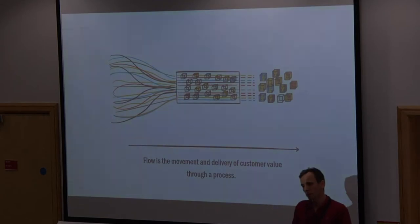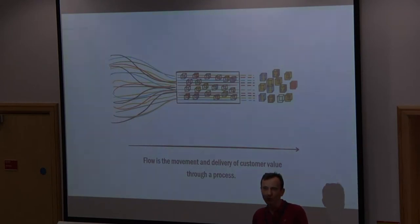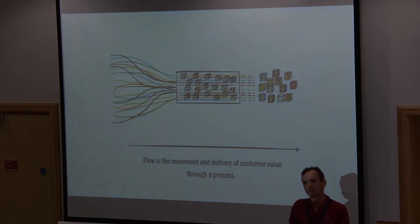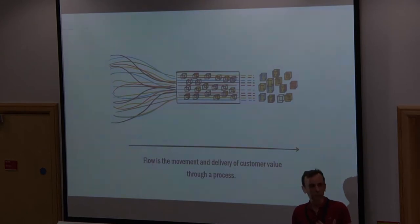So what we've done is we moved away from Scrum, story points, sprints. We moved away from it and we looked at trying to focus on predictability. And we looked at unpredictability as being caused by lack of flow. Therefore, we moved our view or attention to flow, where we look at flow as a movement of value through our process. So by measuring the flow, by capturing these three simple metrics, we tried and we managed to improve the flow. And once we improved the flow, then we are on good solid ground for forecasting.